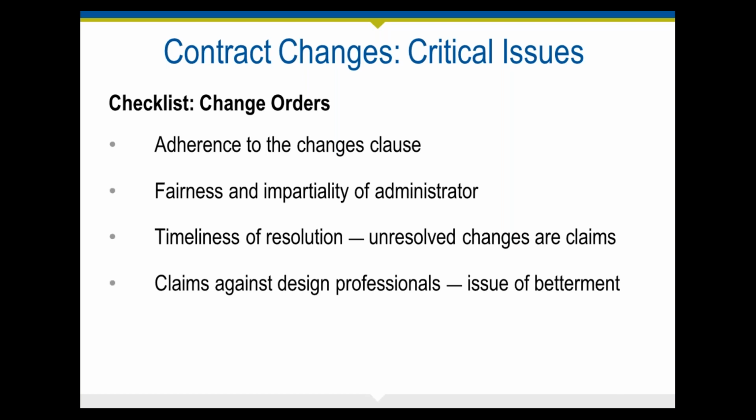One thing that you need to be aware of as a design firm is that if there are changes, and even if your drawings are missing something, the owner oftentimes would have had to pay for the missing item anyway. So if it had been included in the plan, the owner would have paid for that. So let's say your plans are missing a guardrail, which is required. The owner would have had to pay for the guardrail, right?